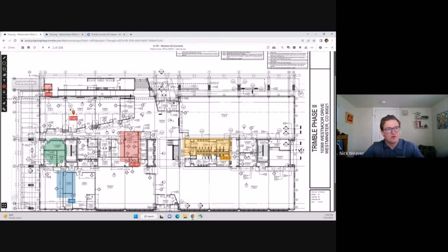So we have that functionality for what we might consider the standard markups that you might be familiar with. But you'll see that that's not the only type of markups that we have on this drawing here. So we also have the ability to link any different record types onto the drawing. So an example for that is these submittals here, right? So right on this bathroom section, I can go ahead and just link the submittal for those water closets on here, navigate correctly to those.